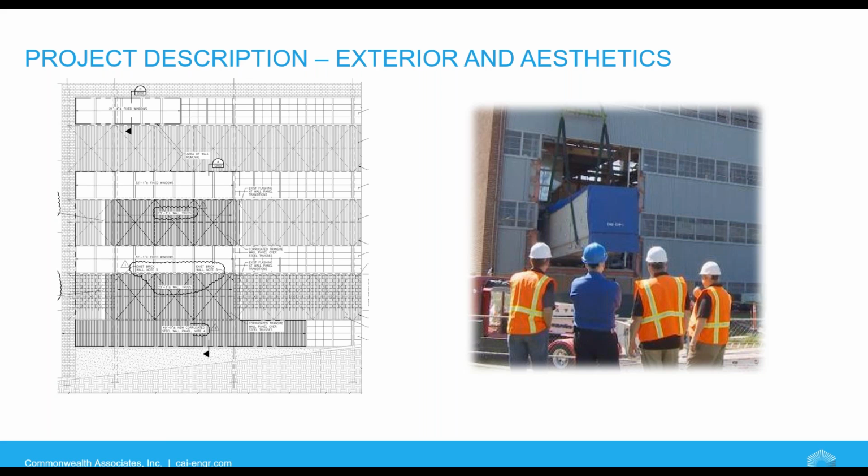Okay, so we've had some big pieces of equipment. So in order to remove the existing CTG, HRSG, and boiler, as well as install the new equipment, the end of the building was opened with the siding and louvers saved to be reinstalled at the end of the project. Saving those allowed the finished product to look the same, since the new siding would have most likely been a different shade due to weathering. So the contractor took great care in removing those items.